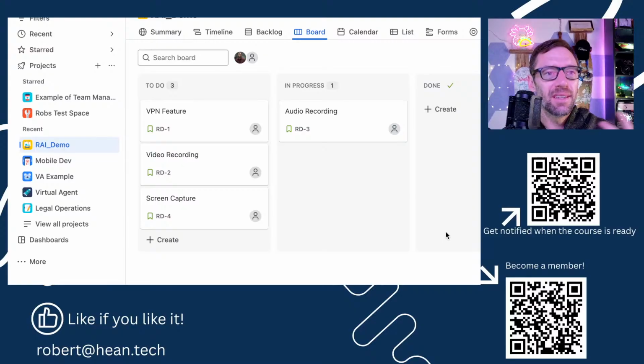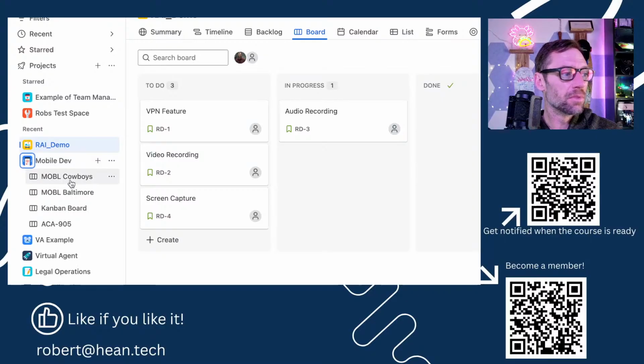It is also beneficial because it allows you to make someone on your team a board admin without giving them project admin access. And that is very beneficial because then you make sure they can't go and change the project. All they get is the board. It's also specific per board, as I mentioned. So each of these 4 boards will have its own list of admins.